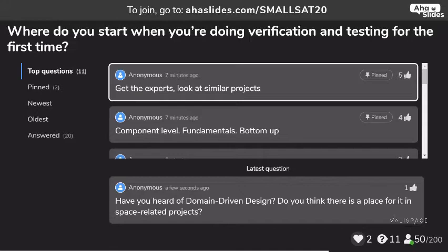If you use testing versus another verification method, analysis or simulation can often be a cheaper way to verify requirements versus doing all tests. And I think that plays into the type of mission you're doing, the class of the mission. Is it a Class D mission, which is open to more risk, versus a Class A mission?